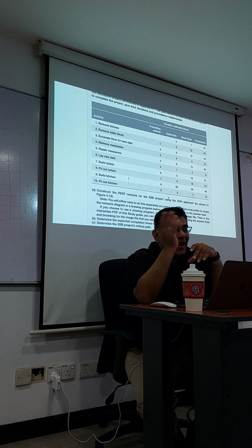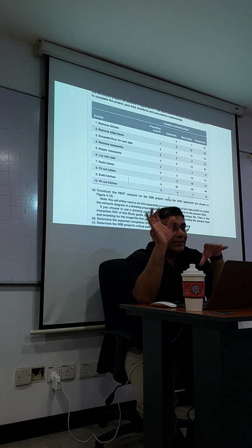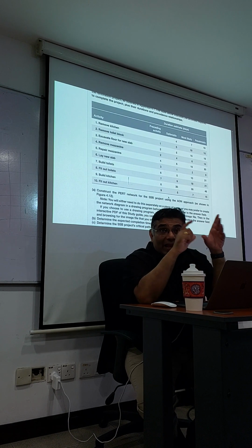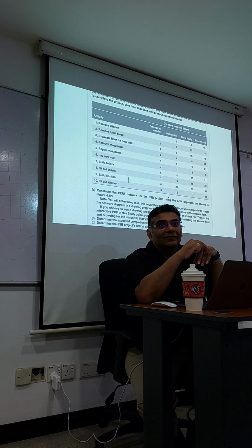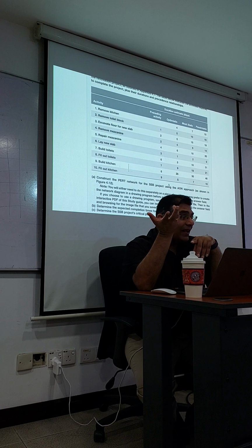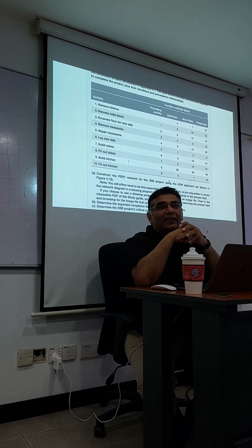After 10, after 10 is end already. Everything goes to one spot called end. No hanging, everything closes to ending. Everything goes to end. Like activity 5, after activity 5 nothing, right? Activity 5 you leave to end.